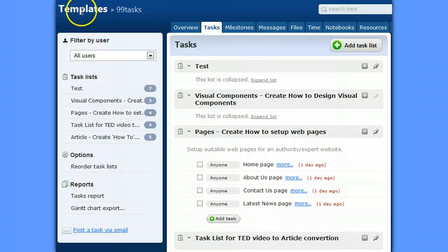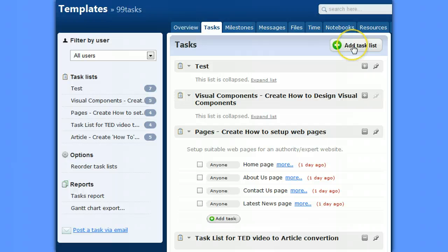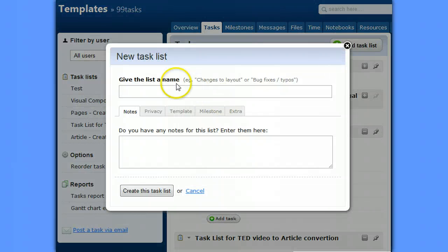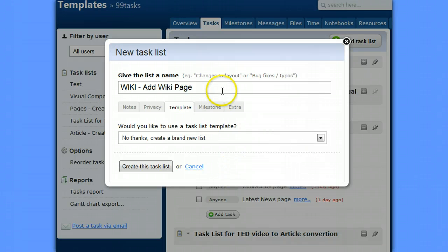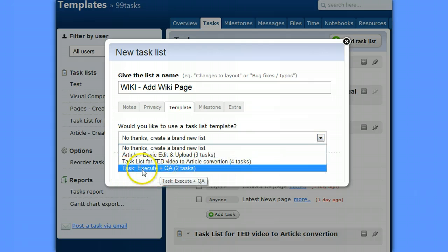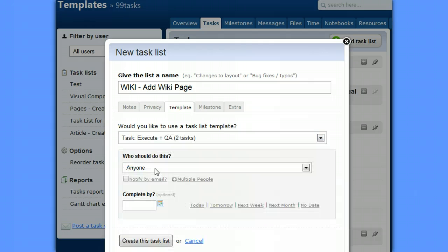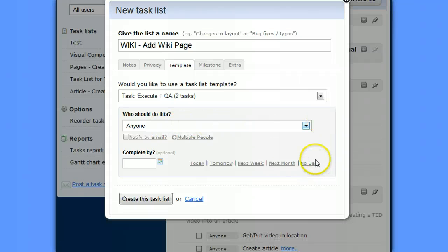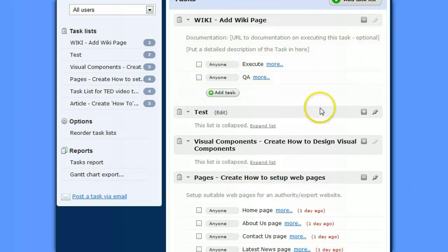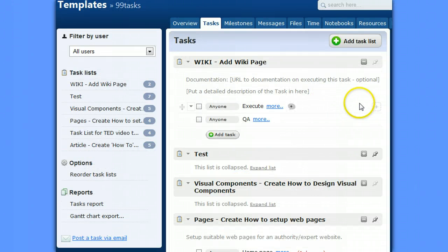So we're in the templates project and we're going to add a task list and we'll give it a name. So we've called it wiki, add a wiki page. We can also go to template and we'll select that minor template, the basic template we had. And we'll leave all these values and just create the task list and see where we're at.